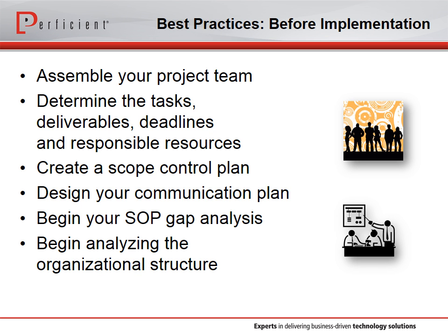You also want to begin your SOP gap analysis. Once you've selected your system, you should have enough information to begin analyzing your existing SOPs and identifying the gaps. And I'm sure you'll all agree that the SOP authoring, review, and approval process can sometimes be quite long, so it's best to start working on that task as early as possible.